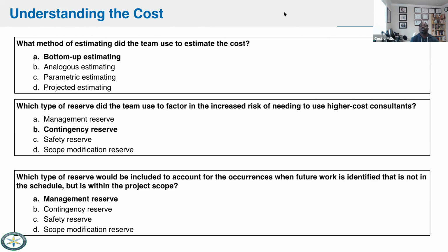So what this is missing here, Dana, is that this type of question from PMI would have some background, like another 6 or 7 lines of text, and it would likely describe the fact that as you were creating your WBS, you missed some deliverables. Because you missed those deliverables, you weren't able to decompose those into work packages and further decompose those into activities that rolled into your schedule.